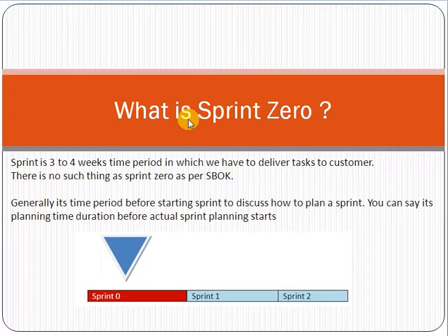What does that mean? That we will divide the 40 tasks into 4 sprints, and each sprint will contain 10 tasks. That means that in 1 month you will complete 10 tasks, and in 4 months you will complete the 40 tasks. Are you with me? Are you getting my point? So that means that in 4 months you will complete the whole e-commerce web application or site. But here there is a difference.